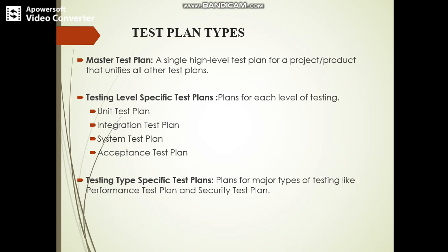Which module requires what testing type, what resources it requires, what manpower it requires, what environment variables it requires, and what setup or requirements that particular type of testing needs. For example, plans like performance testing and security testing. You have to identify that and prepare the plan for it. So there are basically three types of test plans: first, level specific test plans; second, the master test plan; and third, testing type specific test plans. So prepare those.